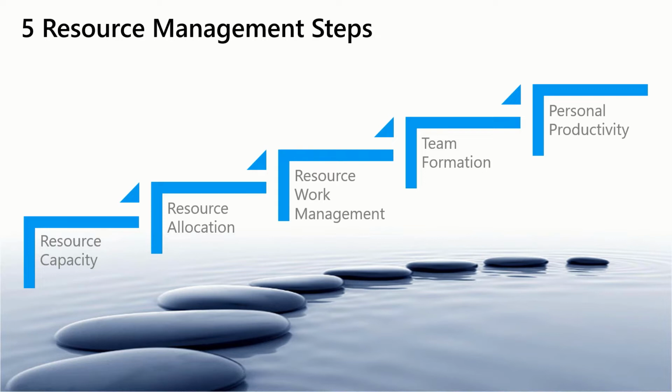Start with high level. I have these projects. I need these roles for maybe a half an FTE over 3 months. That level of granularity sometimes is where people can start and maintain and sustain that information initially.